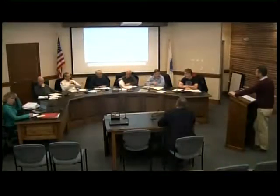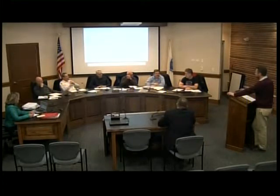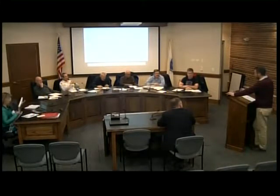No, I think we made the concerns loud and clear with the stability of the slope and the disturbance area being so great, but also means and methods at this level is just way premature till you get a contract. So long as you're willing to acquiesce to a pre-construction meeting where those sorts of details are worked out once your contract is aboard, that's probably the only way we can handle it at this juncture. And I think, Joe, when you see the final wording of the conditions, you're going to feel very comfortable that your conditions have been addressed, and we've made those commitments to you.